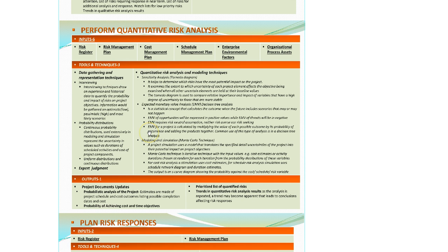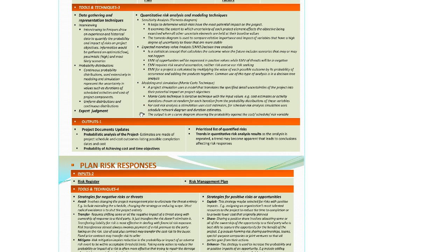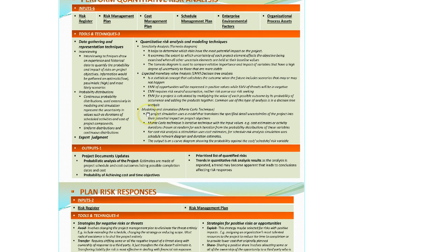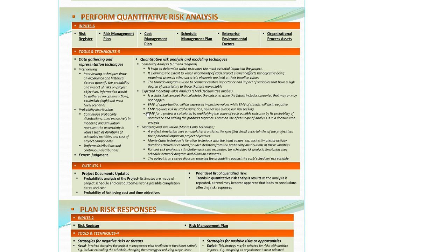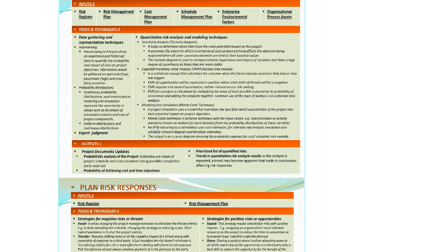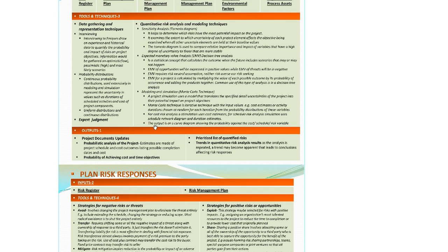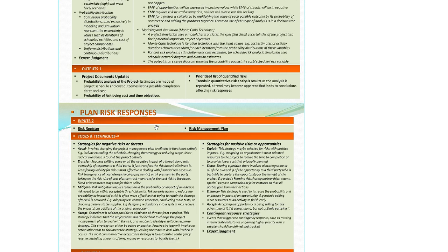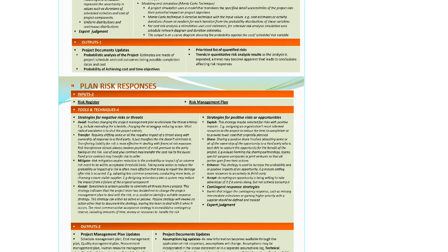So the one after perform quantitative risk analysis is plan risk responses. Now again, the question could be, the project manager with his team has already performed quantitative risk analysis. What's the next thing he's supposed to do? So you should know the next thing is he has to plan the risk responses.